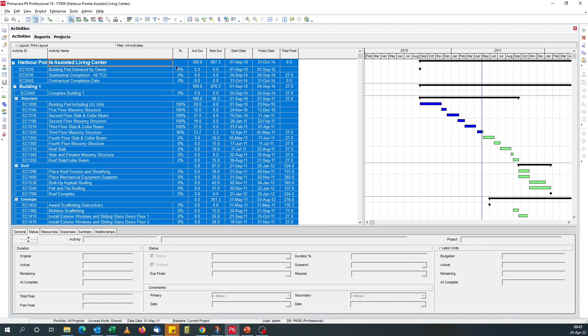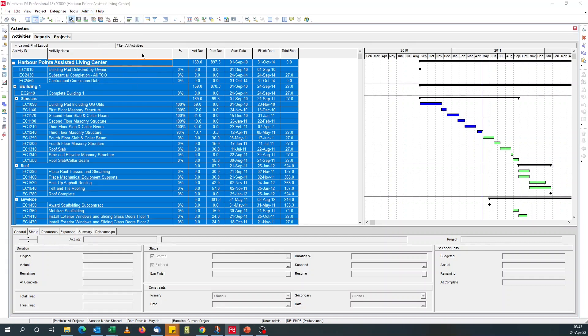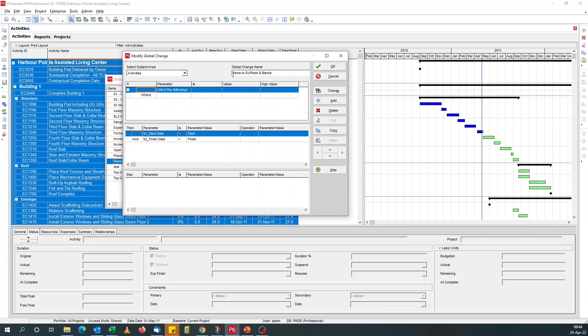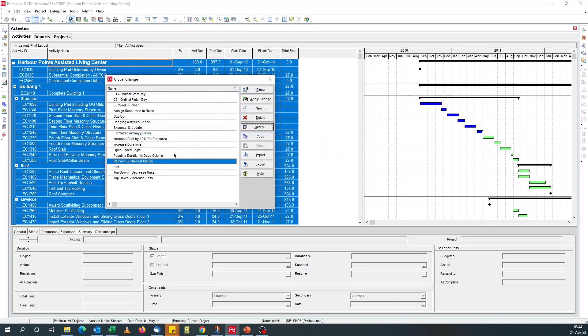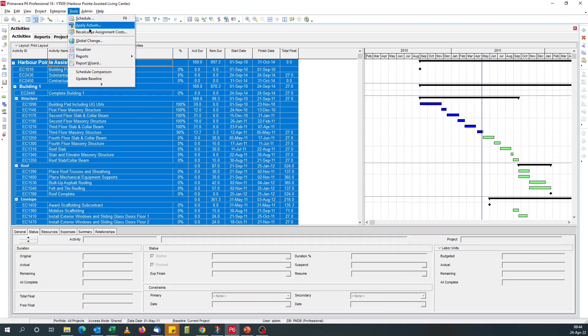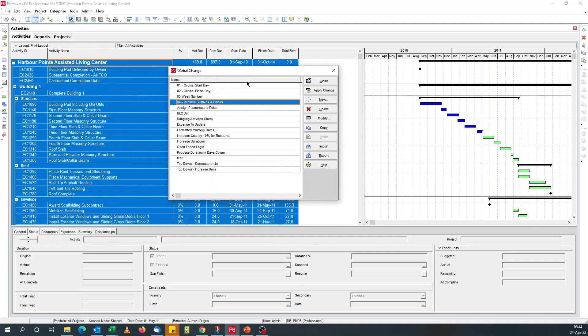But note that any time you do updates, you update your schedule, you make changes to your schedule, you do a time analysis, you need to run this global change. I think I need to give it a number. Modify. Make it zero four. So that appears at the top. You need to run this global change so that your user defined fields are populated.